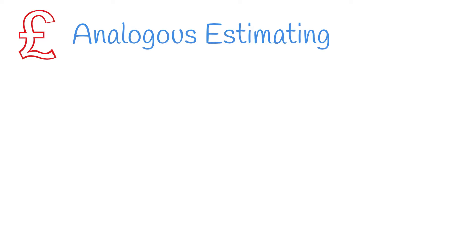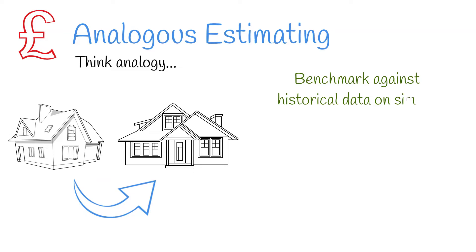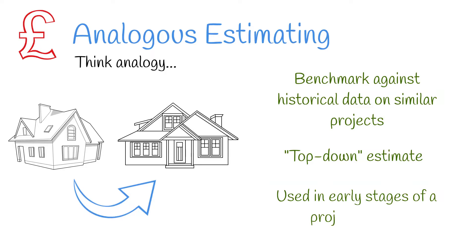So let's look at three common estimating methods used in construction. To start, we have analogous estimating. When you think analogous, think analogy — simply meaning comparing one thing to another, or in this case, one project to another. For this method, you will use historical data to find similar projects which have been carried out, and use that data as a basis to form your estimate. This is often referred to as a top-down estimate, and is used when the project is in the early stages and there are limited amounts of information available.